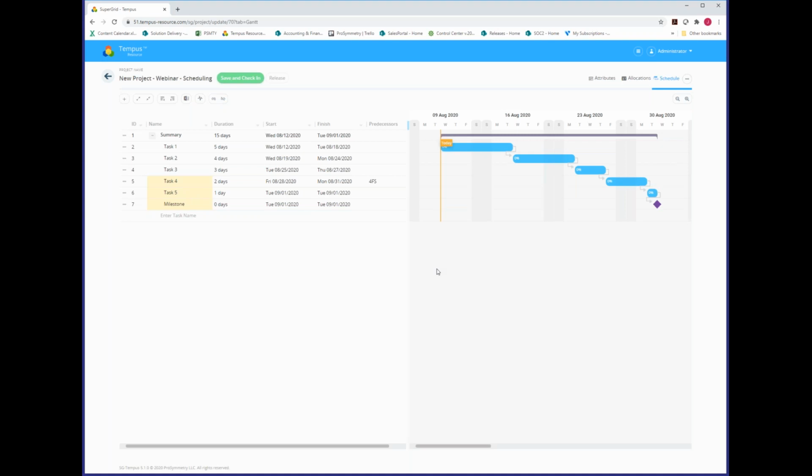Okay. Now that brings us to another point. This is a critical path scheduling tool set, which means it's going to automatically calculate start and end dates, but it's also going to calculate any slack, meaning how much can tasks shift or move without impacting the currently calculated finish date of the project, hence the critical path mode. It does a forward and backward pass, the conventional stuff you'd find in the CPM algorithm, and that is built in as well.